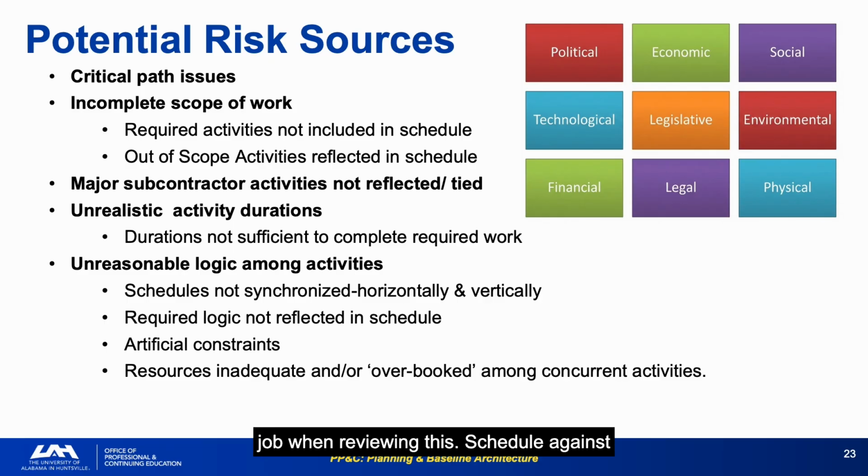The analyst's job when reviewing a schedule against the risk register is to determine whether the top risk areas are represented by schedule activities with appropriate durations and resources. If the risk register lists software integration as high risk, but the schedule has only 6 weeks for it, you have a problem.